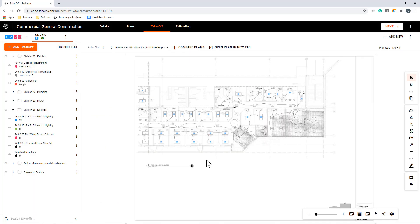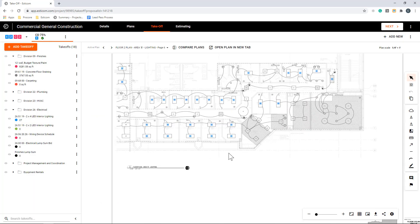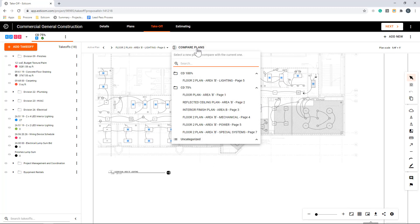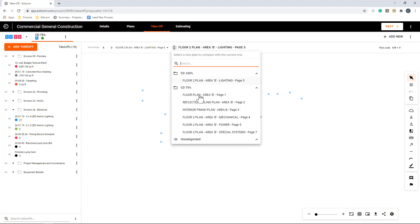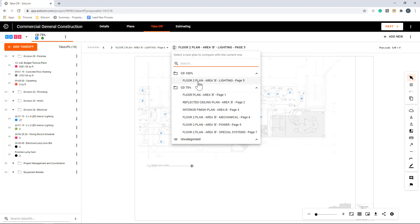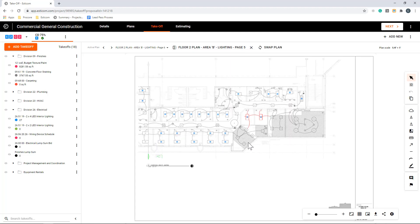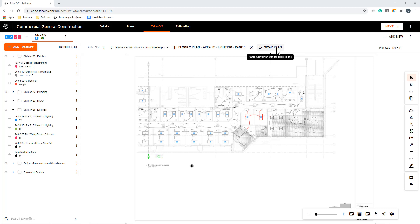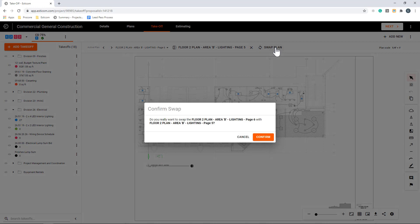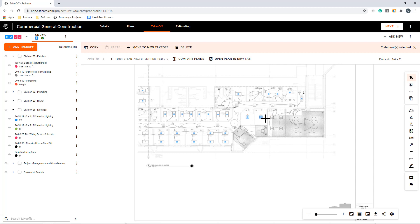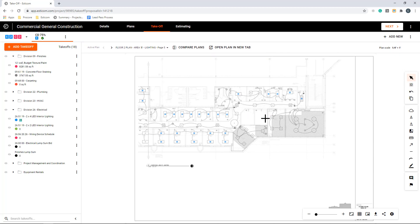Another great time saver is the plan comparison tool. This allows you to overlay a revised plan on top of an existing plan to see what is different. Anything that's been removed will show up as red, and any additions are in green. This makes estimating revisions simple and improves the accuracy and speed of your takeoff. We can now click swap plan to move the takeoffs over to the new plan set. We can now use the multi-select tool to delete the two lights that were removed from the new set of plans.